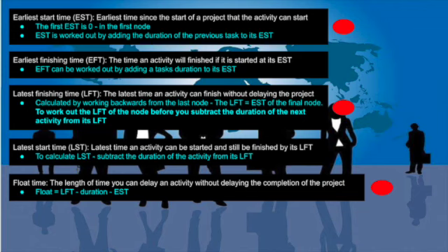The last one you do need to know, the float time. This is very important. It's the length of time you can delay an activity without delaying the whole completion of the project. So in simple terms, how long can I stop doing this activity without affecting the overall project? And to calculate, you get the LFT and you minus the duration, and then you minus the earliest start time.